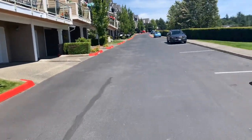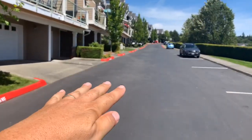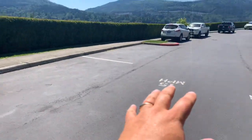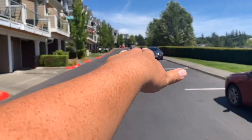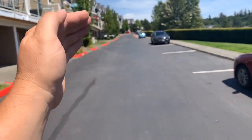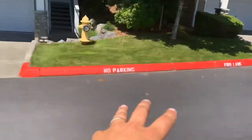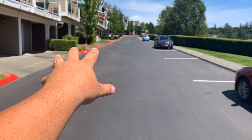All right, so when we go to do the seal coating, okay, we wanna take this half of the road, block it off, and then seal coat this side. When we do that, we'll end up putting in that 15 mile per hour stencil, okay? Same thing down here. We'll block the same side of the road on this side. So as they go back up here, that side of the road, the left side will be blocked off, and we'll seal coat it. We'll block off as you go up the hill. We're gonna block that ramp that comes down the hill. We're gonna block it off up there because people who live up here can drive out that way and exit. People here on the bottom through this stretch, this is their only way out, is that direction right now. So we'll just block that side off.